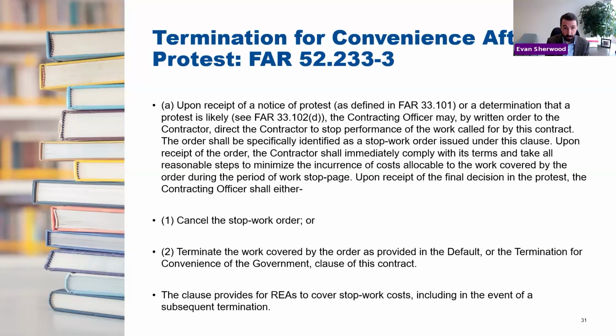Another closely related concept is you can claim your stop work costs. And by the way, that's generally true. Stop work orders often are treated like changes or delays under the changes clause, which give rise to similar claims for costs. Sometimes the government's thinking about terminating, it'll give you a stop work order first, and you might have stoppage costs. It has the same kind of concept of what can you do to reasonably reduce your costs. Just be mindful that there are a variety of ways this can appear, including following a protest, and you have rights there as well. Okay, that brings us to the end.